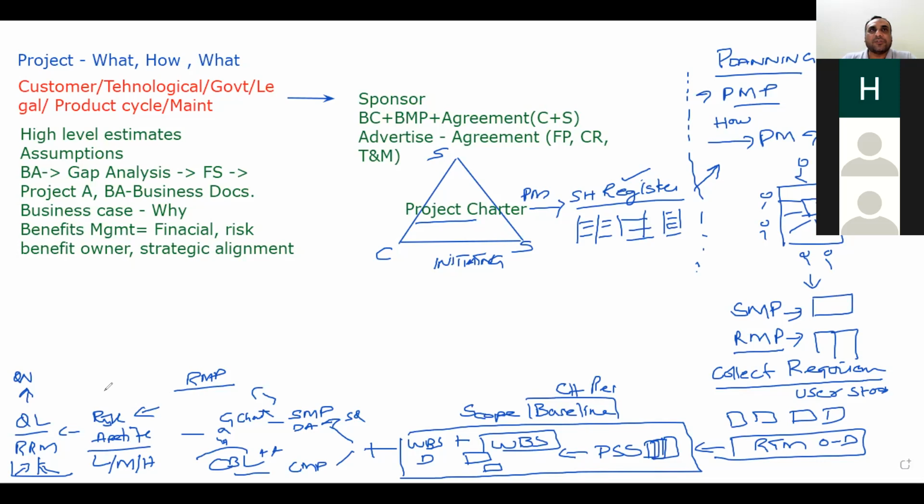What are the risk responses for negative risk, which we call threats? You can avoid it. If you cannot avoid it, mitigate it, reduce the impact. If you cannot do that, transfer the ownership of the risk to a third party. For the opportunities, or positive risk, we can exploit it, making sure that we do it. Enhance it. We can enhance things at the time of planning, or we can share it if we don't have the expertise, instead of letting it go. And if we cannot do it, in both cases, we will escalate it.